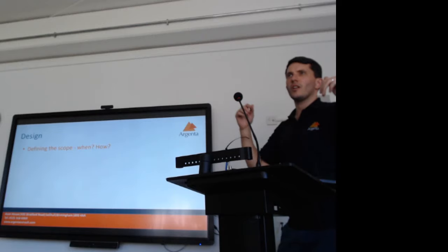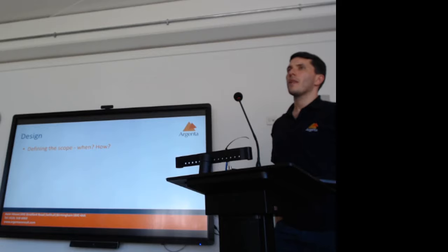I think the good approach that we normally take is to have a one-day workshop where we go in, see all the stakeholders in one room, and ask all the relevant questions in order to build a requirements doc.